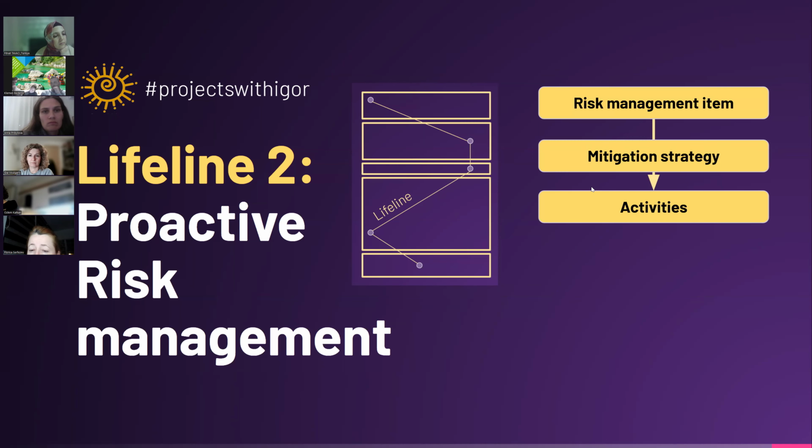Now evaluators want to see another step: how this mitigation strategy is applied back in the activities. Meaning, when you define the activities, you already need to implement mitigation strategies, not just state them on another paper. And that is a big difference.